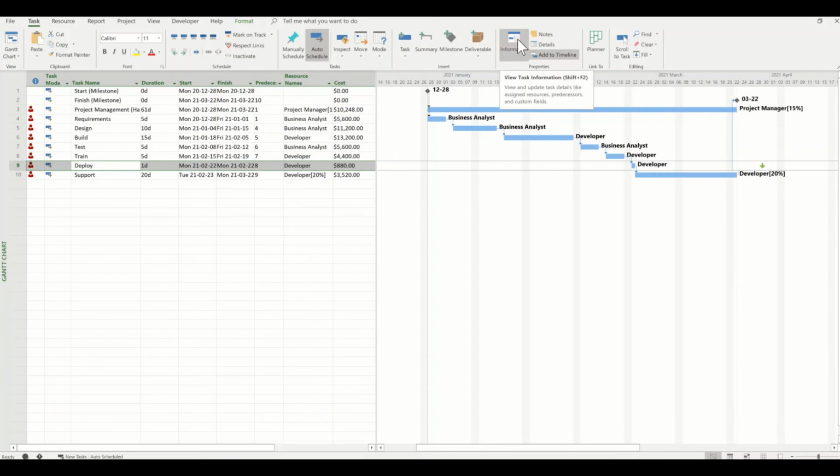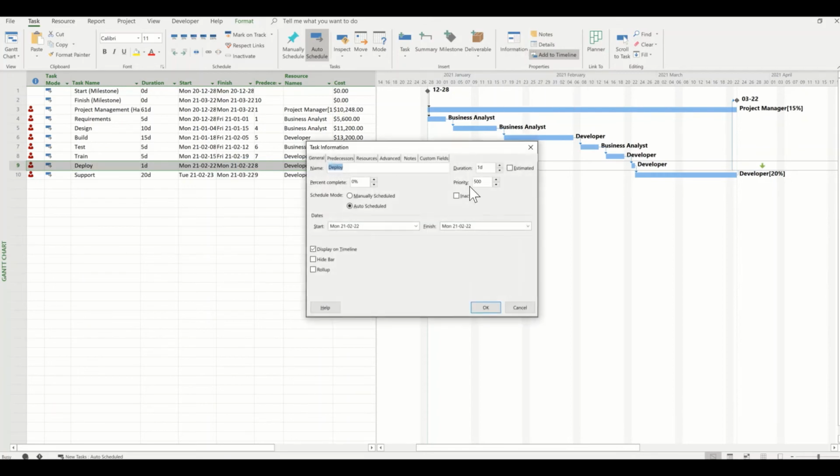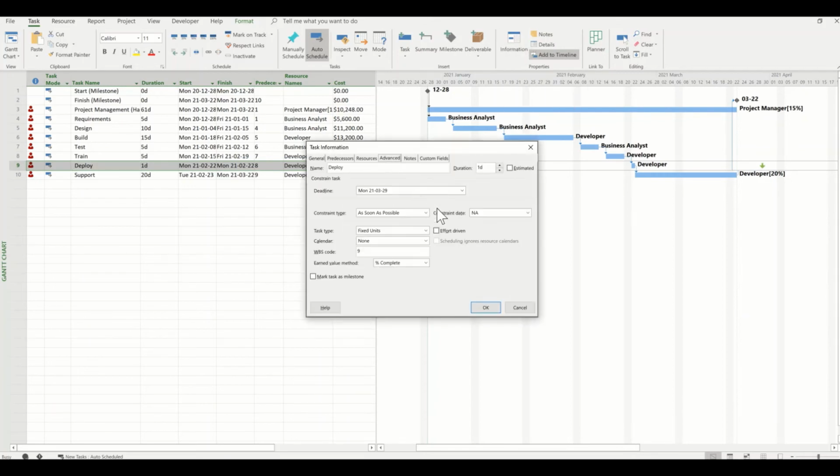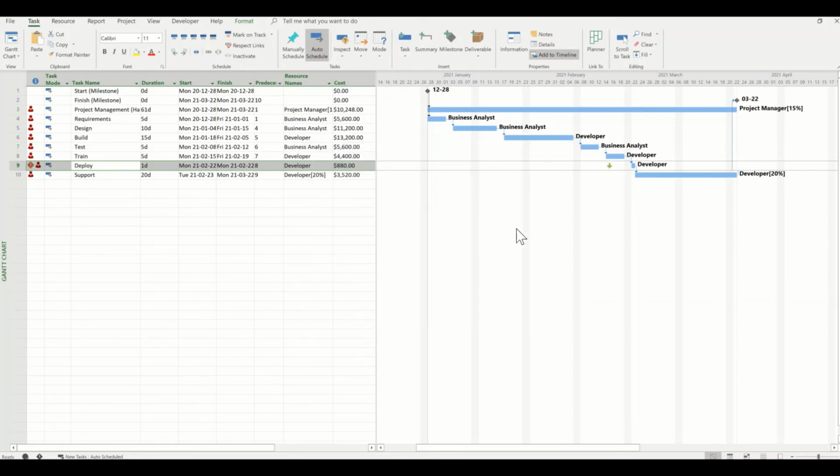Let's take a look at what that might look like. To simulate that, we're just going to simply move my deadline date. So we're going to move it back to February 15th. My arrow has now moved before my activity, and over here in the left column you can see this little exclamation point has popped up showing me that I've got a problem on my schedule.